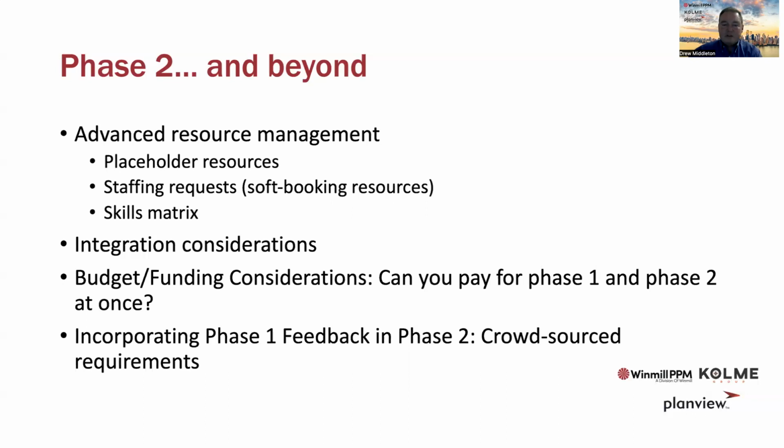Or we could have a downstream integration where data in the PPM is generated, refined, and now it's ready to be pushed somewhere. That could be financial data. If we think about our project budgets and our project forecasts and costs, well, maybe the forecasts just stay in the PPM, but the budget might need to come from the financial system. And our actuals need to get into that financial system as well. So integration is definitely something to look at in a phase two.